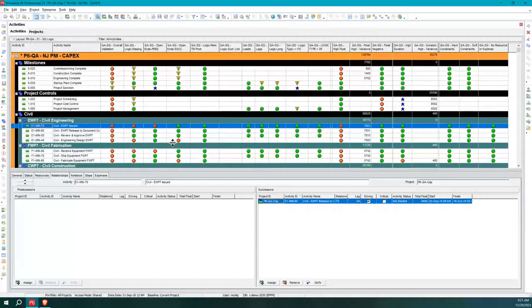Okay. Now let me just go back to more of a table area. You can see that the first one is still missing a predecessor. Okay, so that's not great. Maybe we should tie this to something else. Maybe I tie it to a milestone up here. So project sanction might be my first milestone. But there may be times where you're comfortable with the fact that there's no predecessor on it. That's what this little blue star is used for. So that way I don't have to keep seeing this red stop sign every single time.